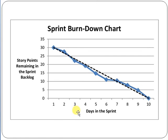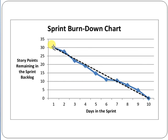Let me show you the sprint burn down chart. On the X-axis, you have the days in the sprint — for example, 10 working days. On the Y-axis, you have story points, which represent the hours for functional requirements — for example, 35 hours. The straight line on the chart shows the planned work. For instance, within 10 days, 30 story points should be completed according to the plan.